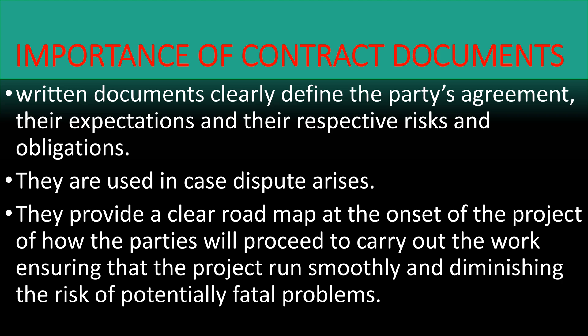Number three: they provide a clear roadmap at the onset of the project of how the parties will proceed to carry out the work, which helps to ensure that the project runs smoothly and diminishes the risk of potentially fatal problems. The roadmap is set by the drawings, the specification — everything is set clearly so that we can avoid issues when the contract has been awarded and construction has begun. Someone may say they did not specify that type of tile or the exact ratio of concrete — so these contract documents help to reduce potential problems before the project begins.